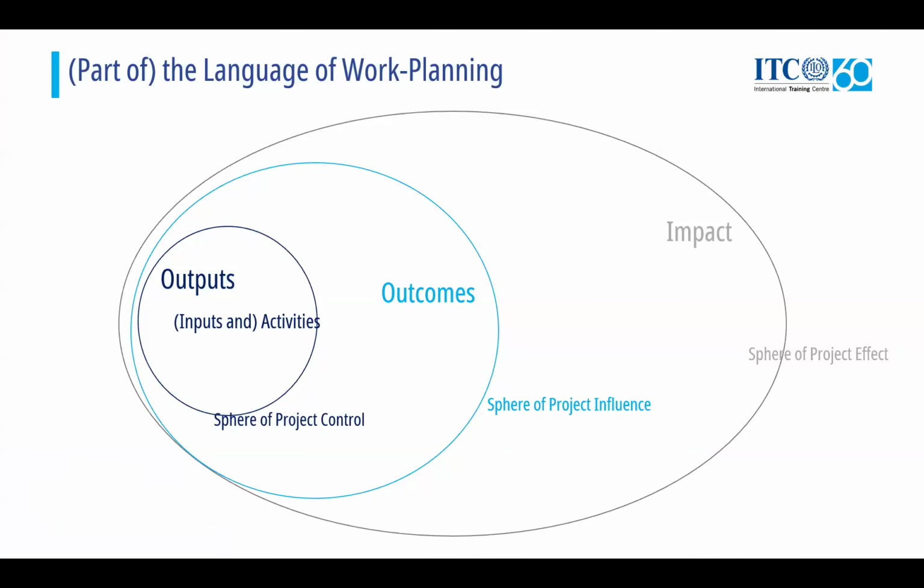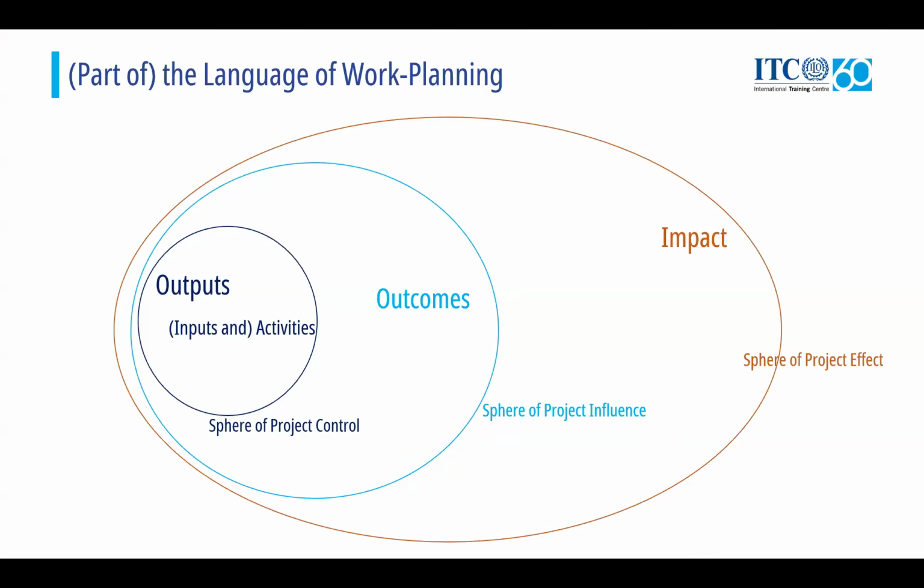What's important is if you don't have strong baseline data, maybe you should make it part of your project, right? In the initial stages, maybe you can integrate a part of the project that seeks to do some initial data collection, because by the end of the project, it will be difficult for you to be able to say, did I achieve my objectives if you don't have some kind of measure?